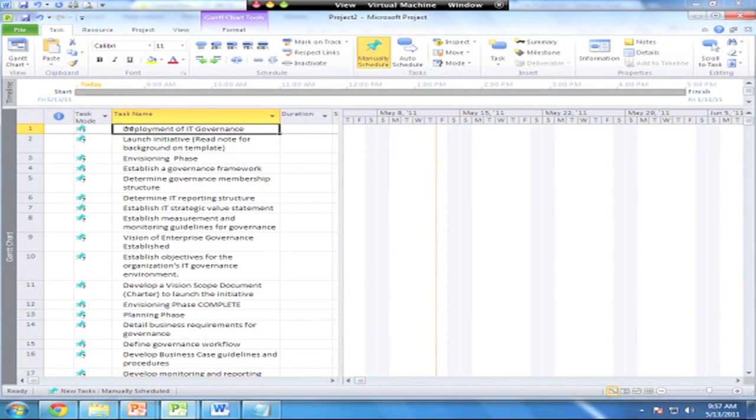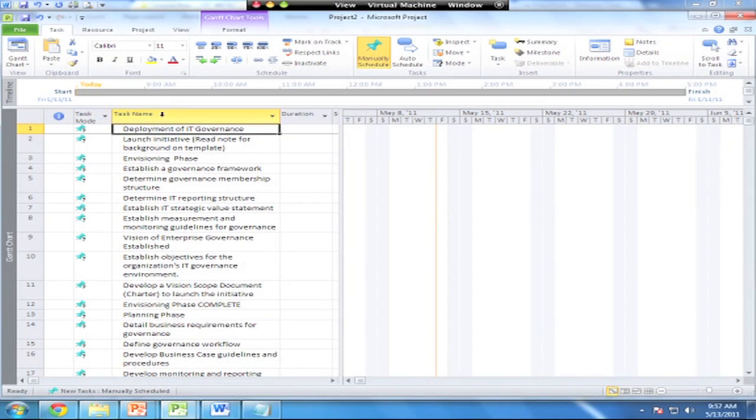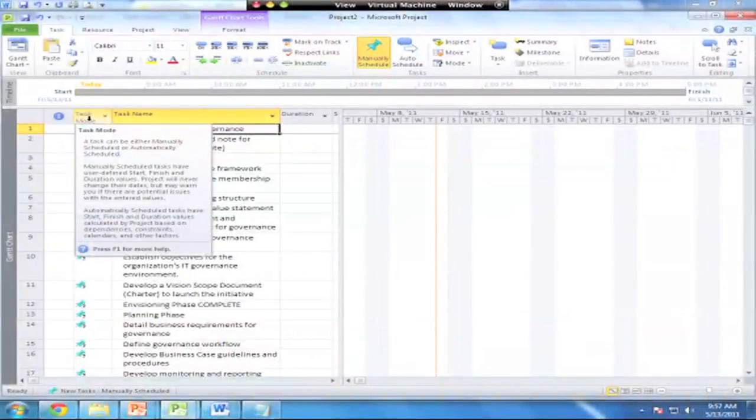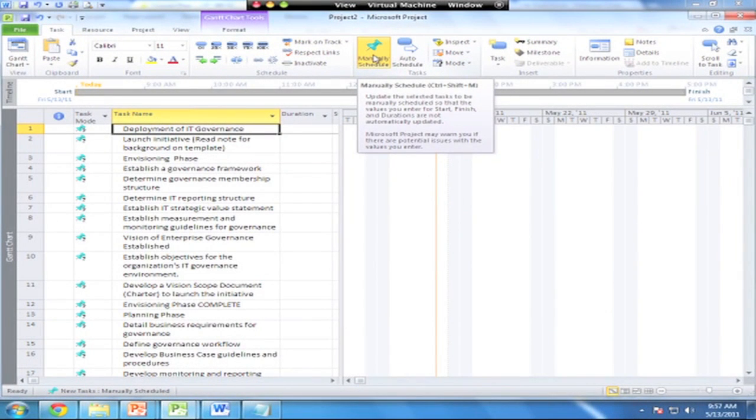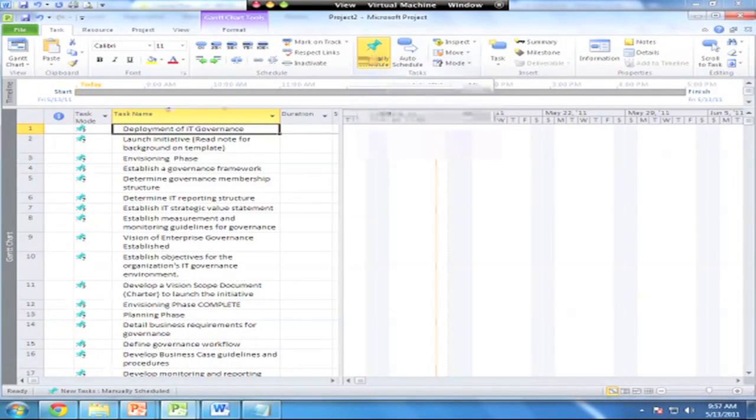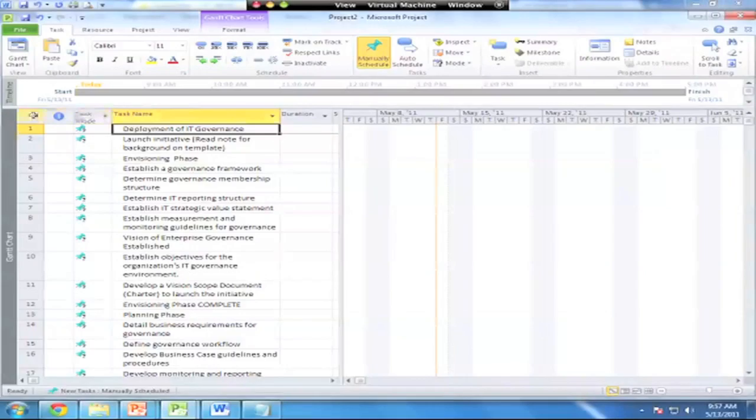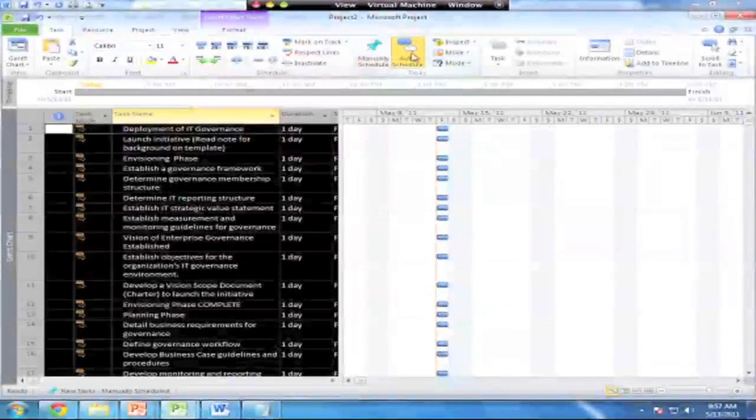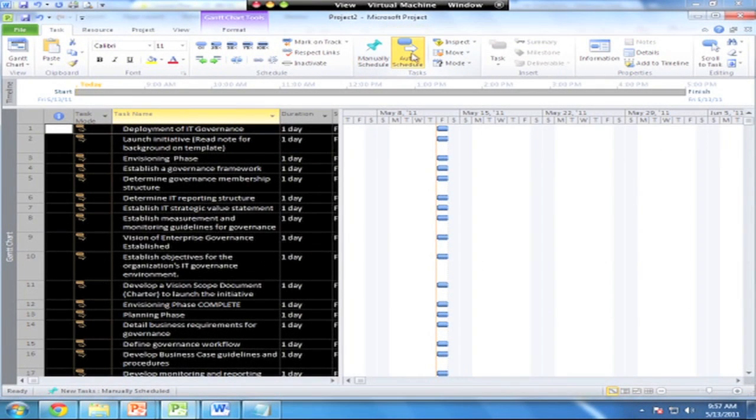Let's go back over to our blank original screen. At this point, all I have is a task list. First thing to understand in dealing with tasks is you've got two modes. Right now, everything's scheduled in manual mode. Everything has these pins on it, which means they're manually scheduled.